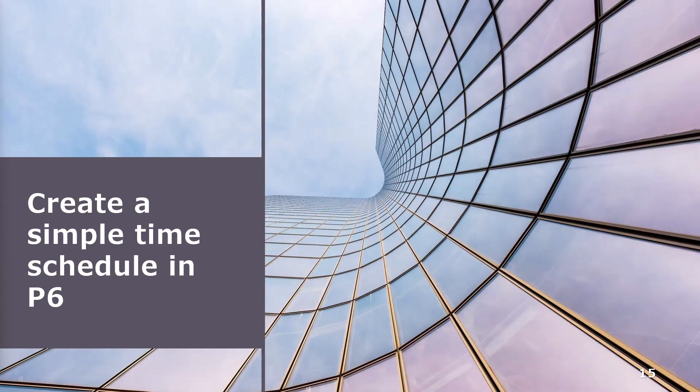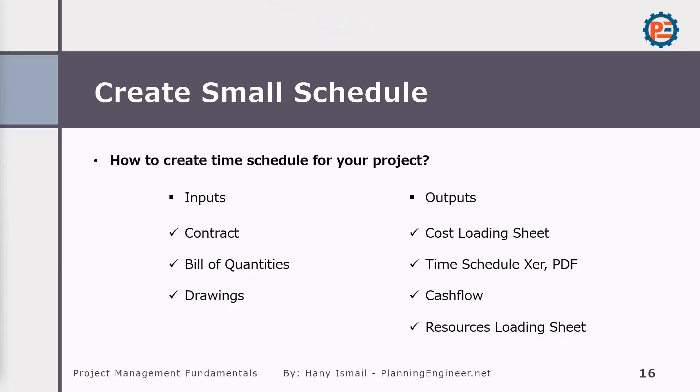Let's create a simple time schedule in Primavera P6. How difficult it is. But before going to it, let me tell you what are the inputs and what are the expected outputs. So here in order to create a time schedule, we need a contract. We need bill of quantities and we need drawings. And we'll explain why we need these documents in a minute.